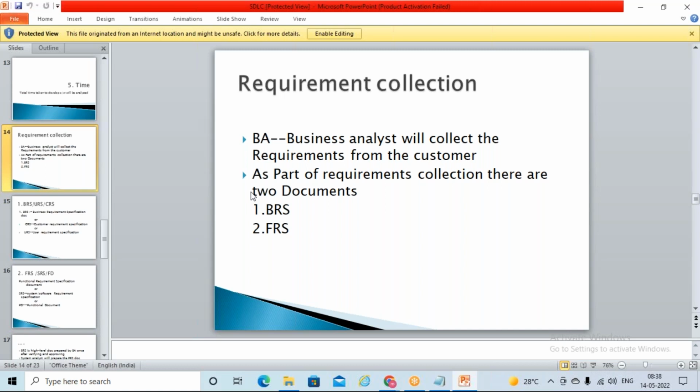Here, as the agile part, those huge requirements are split into small requirements. A small requirement can be considered as one user story. So in the form of user stories, what is supposed to be delivered to the client is called the product backlog. From the product backlog, we analyze what we are supposed to deliver for sprint one, what for sprint two, and put it ready.